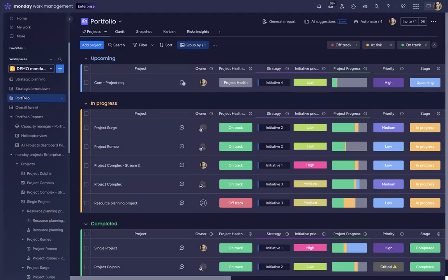As soon as you understand your projects and your operational tasks, then you will need to link those projects to strategy initiatives. So the quickest way to achieve this state is first to understand your portfolio, and second to link those projects that you currently have in your portfolio to the strategic initiatives. If those projects are linked to the strategic initiatives, then you'll be able to understand where exactly you are going.